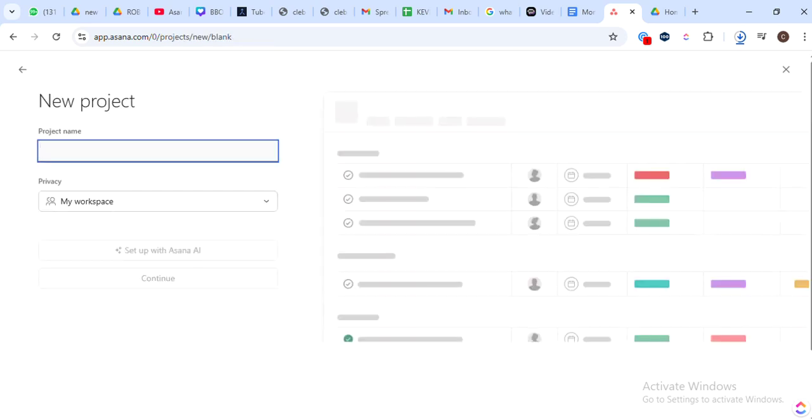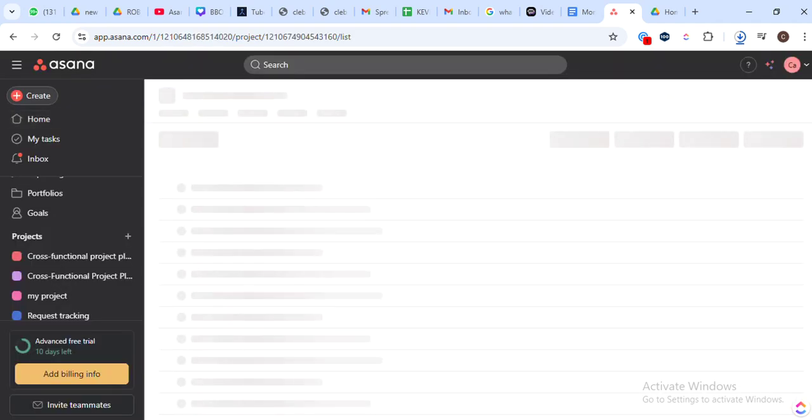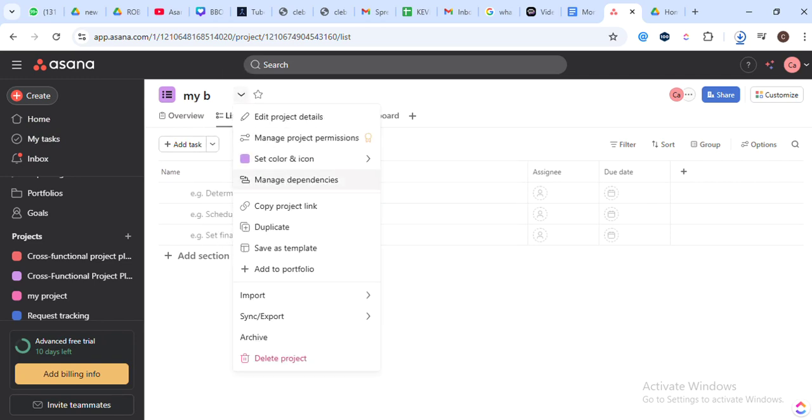Now that we've done that, step 2 is to click on the Add Tasks dropdown, then select Import Spreadsheet. The reason we do this is Asana uses CSV files to create new tasks, assignees, and due dates. It's a simple way to bulk upload and organize your tasks efficiently.